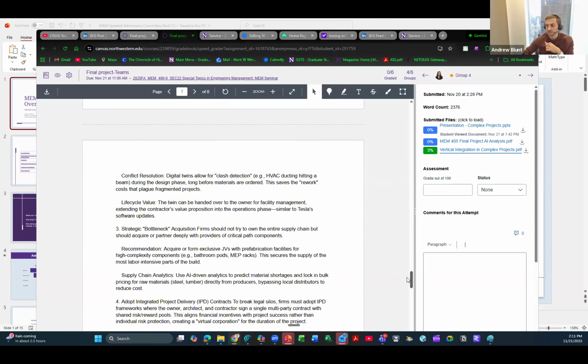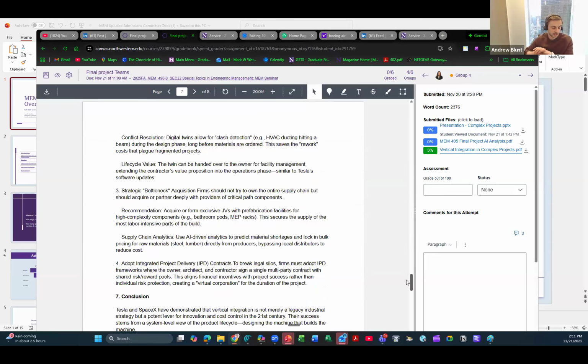That's when you model everything in 3D for construction, often in software like Revit. If you can get all the contractors within the same model, and use AI to help find conflicts and suggest solutions, that can prevent issues in the field by solving them in your digital twin first.